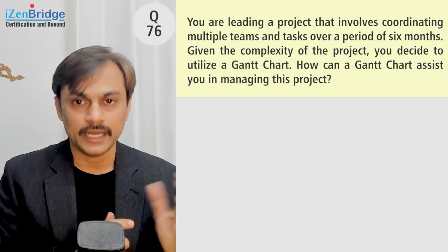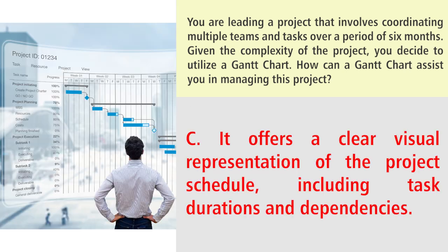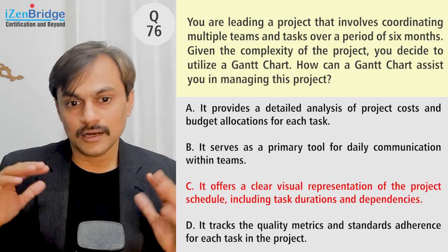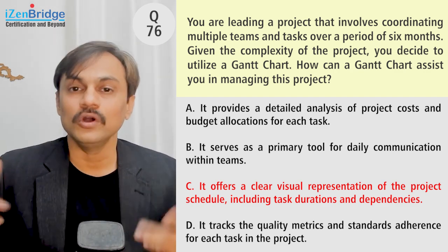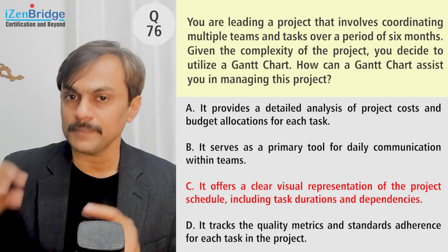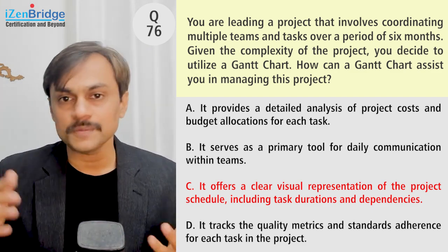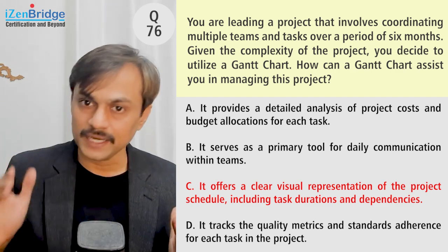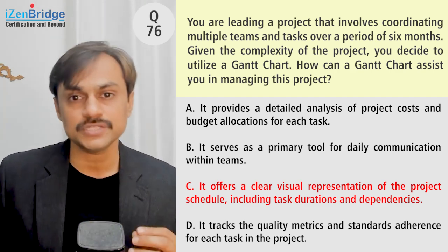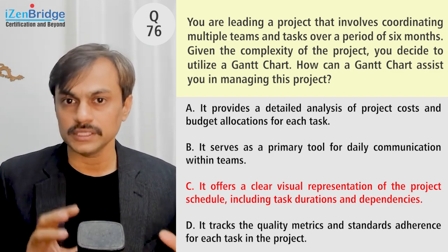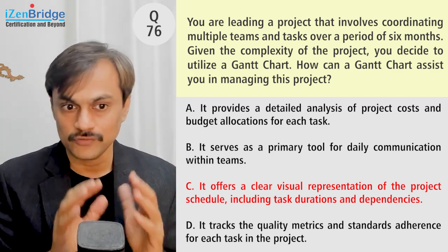Option C: it offers a clear visual representation of the project schedule, including task duration and dependency. That seems to be the primary purpose of a Gantt chart. Comparing B and C — option B suggests you'd only ever look at the Gantt chart as your primary daily tool, which may not apply to all projects. But option C's utility is always present: visual presentation of schedule, task duration, dependencies, milestones, critical path, and progress tracking. Option C looks great.